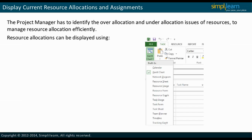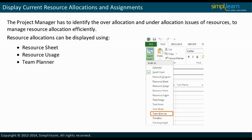Resource allocations can be displayed using the Resource Sheet, Resource Usage, and Team Planner views in Microsoft Project 2013. The quickest way to display these views is to select from the built-in Gantt chart list of the Task tab. We will cover each view in detail in the forthcoming slides. Let us begin with the Resource Sheet view in the next slide.